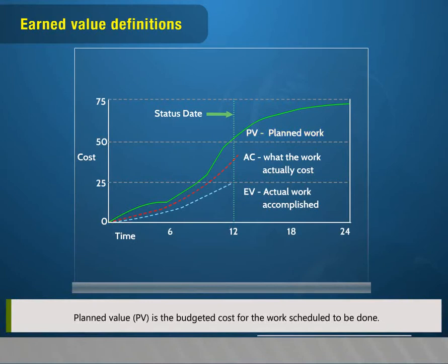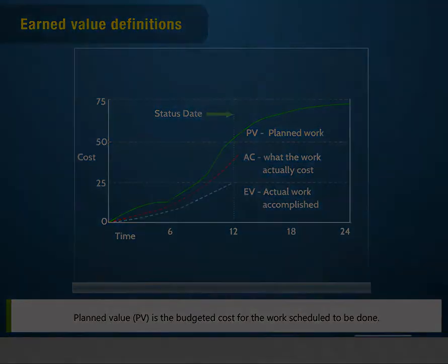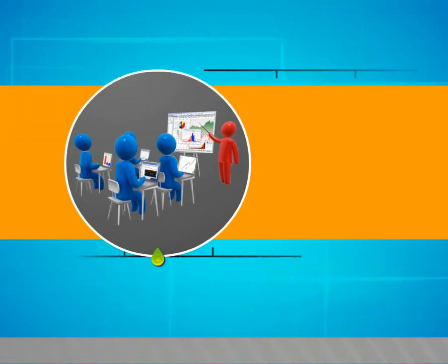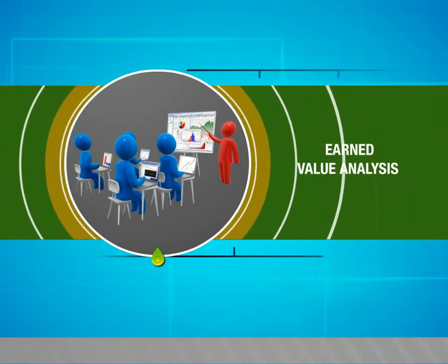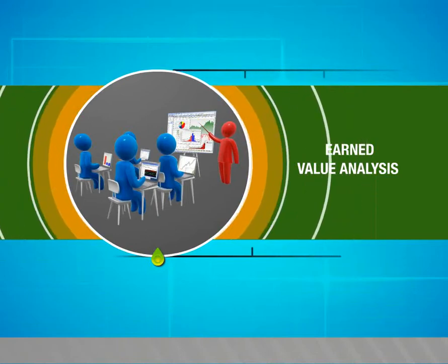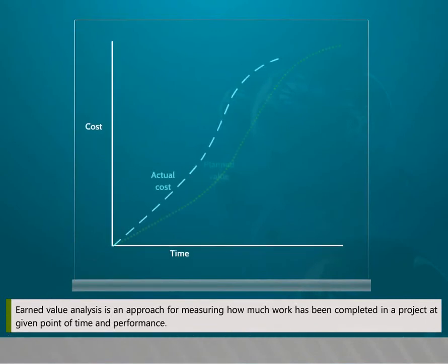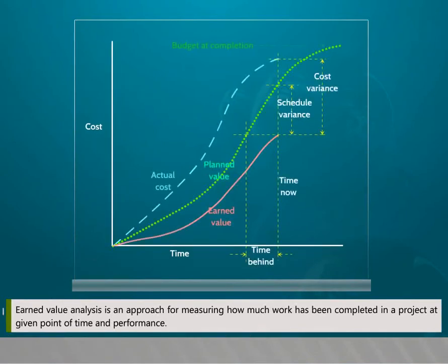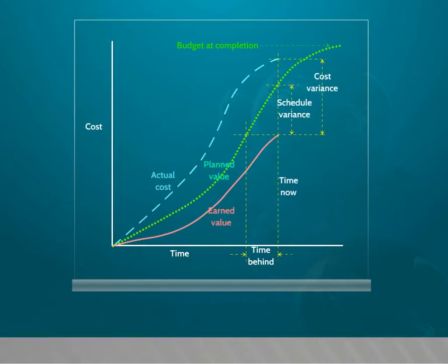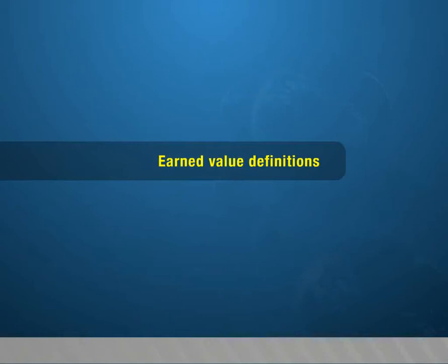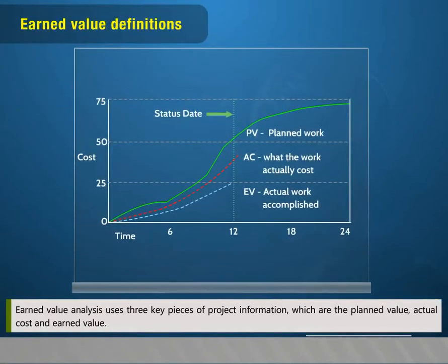If the time taken to do the particular task is greater than what was planned, it means that the project is running behind schedule. Similarly, if the resources utilized are more than what were planned, it means the project has not been managed efficiently in terms of resources. Formally, earned value analysis may be defined as a tool to objectively measure project performance by integrating scope, time, and cost data. Earned value management also provides a means to forecast future performance based on past performance.